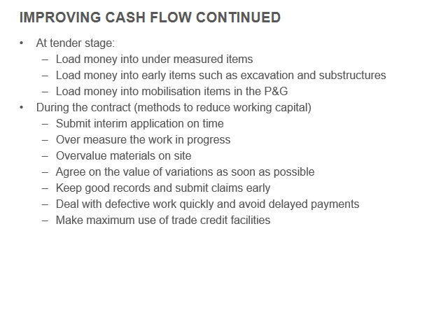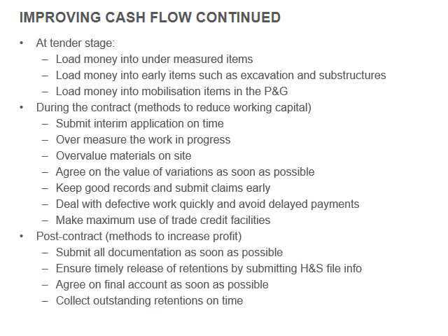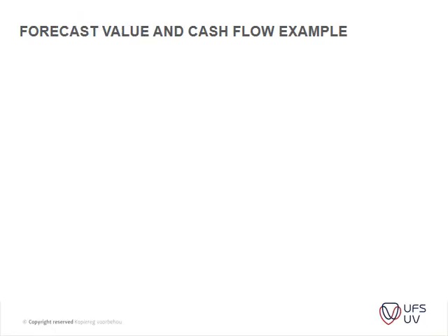If you've got a 3-month contract, you have to be finished within the 3 months. Post-contract is submit all the documentation as soon as possible, ensure timely release of retentions by submitting health and safety file, etc. Agree on final account as soon as possible and collect outstanding retentions on time. Okay, so we've dealt with a couple of these in the previous chapter, but please make sure, this is a very important slide for me. You will have to be able to discuss this.